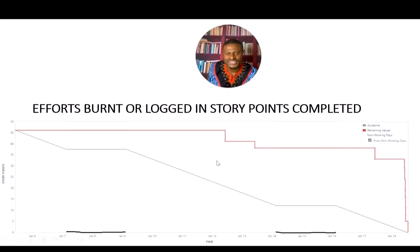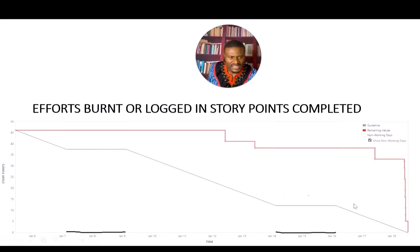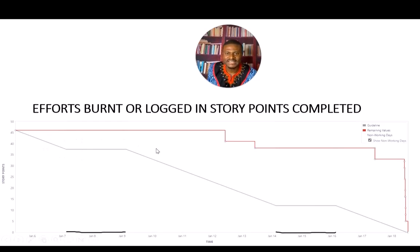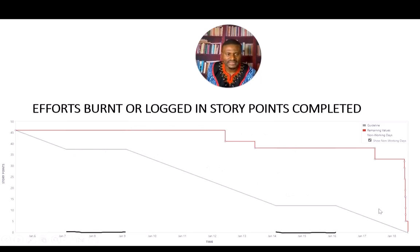There are two lines on this chart. The first is the gray line, which we call the ideal (ID) line. Based on the 46 story points this team planned, Jira automatically generated this ID line. Keeping everything constant, if the team works at a constant pace, this is what the remaining value line should look like. But in a typical real-life environment, it's very difficult to have a chart that mirrors the ID line exactly, because of unforeseen distractions.